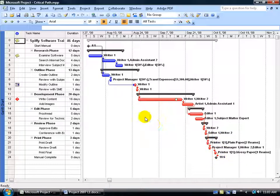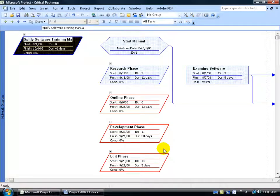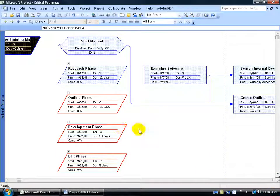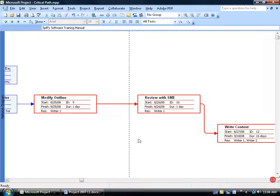Another place you can view your critical path is the network diagram. Right-click on the collapse view bar, go down to Network Diagram, and there we go. We have our Start Training Manual project summary task, the Start Manual milestone, and our phases listed. Scroll over to see the tasks in their linked relationships. You can scroll and see how it goes from non-critical to critical path — from the Modify Outline point forward, moving that out will affect the project's end date.